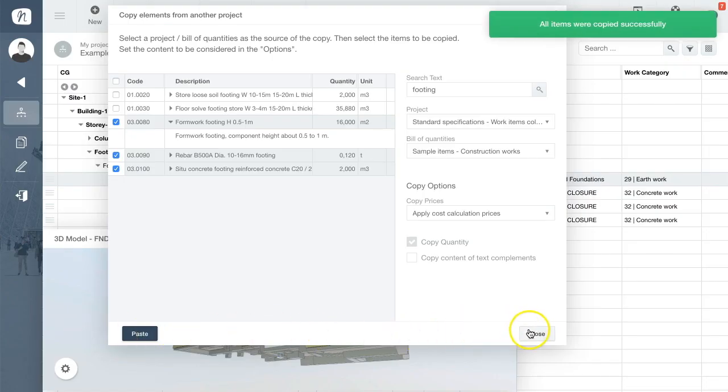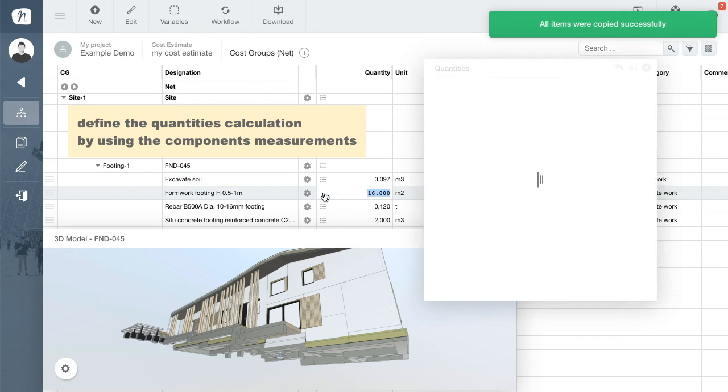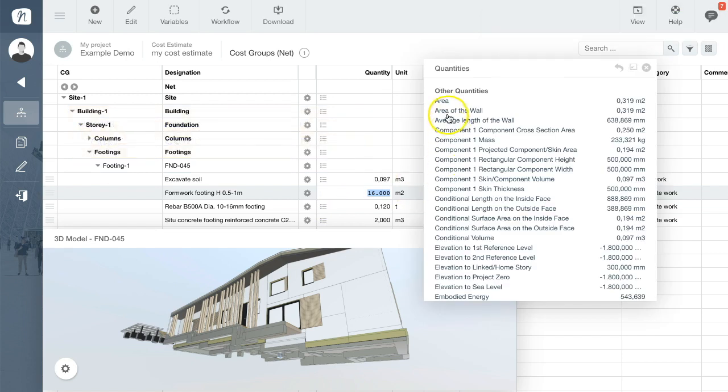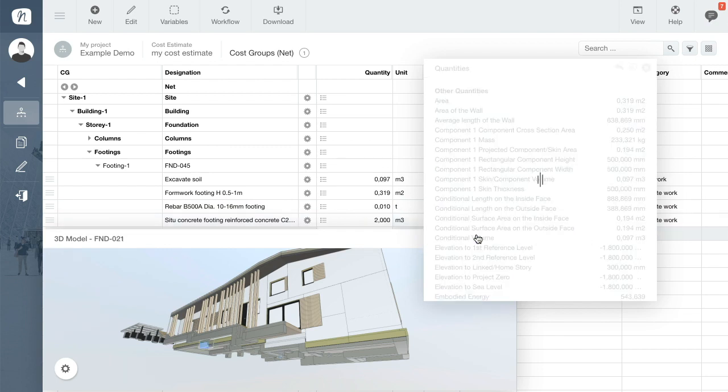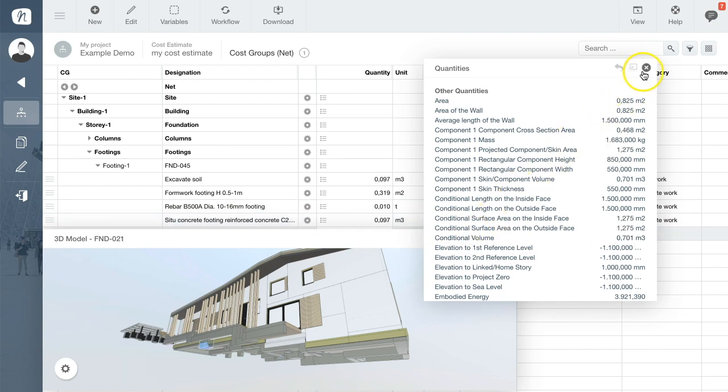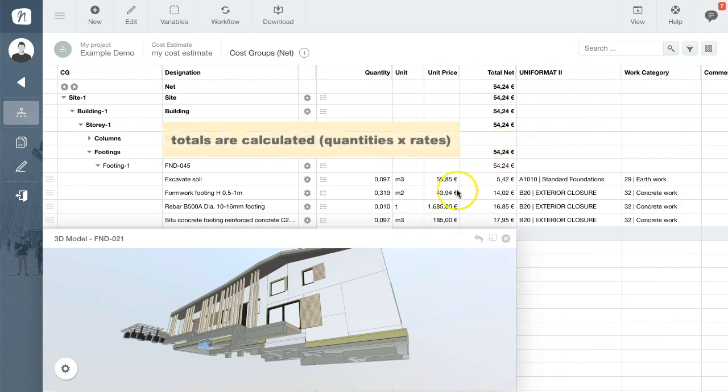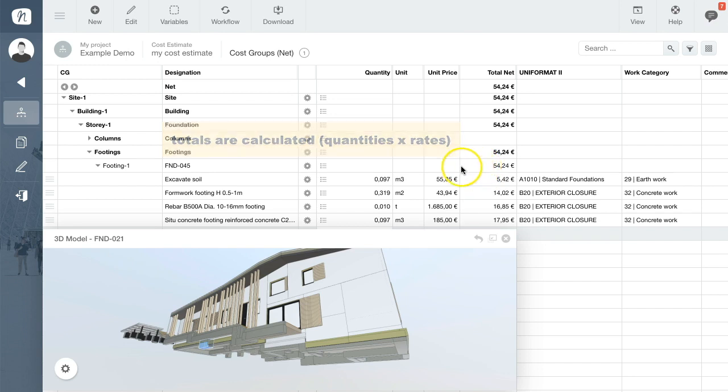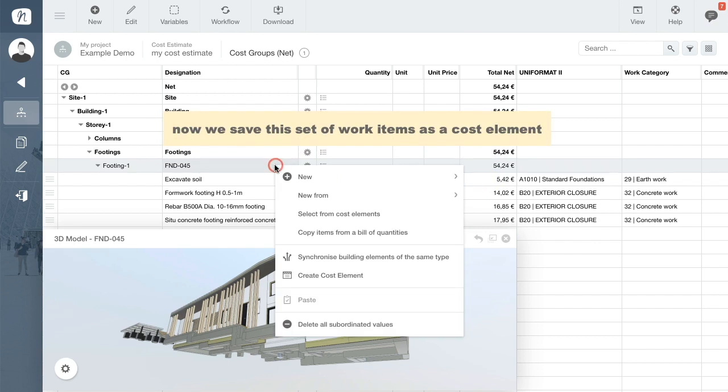They appear immediately as subordinated rows for which you will again need to fill in the measurements of the building element to calculate the quantities. Don't worry, you'll only have to do this once. The total costs per work element, the quantity multiplied by the unit price, are now shown and summed up in the calculation table under Total.